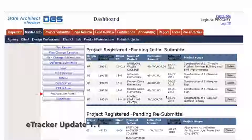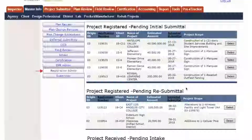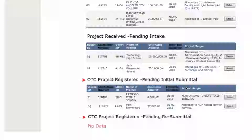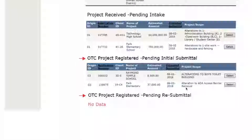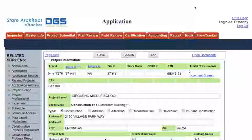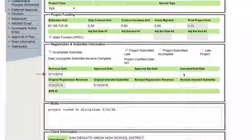Document submittal e-tracker update: The DSA registration administrator will receive notification that projects are due for OTC submittal in the registration admin dashboard bins: OTC project registered pending initial submittal, and OTC project registered pending resubmittal. The DSA registration administrator will receive an email notification from DSA Box when submittal documents have been uploaded. Open the e-tracker application and update the received date. If documents are not submitted, the registration administrator will indicate late submittal in e-tracker and send an email to the client and design professional with notification that re-registration is required.